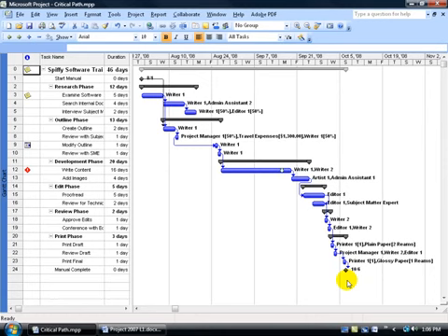Now what we did to find out what series of linked tasks are critical or within the critical path is we came up here and we used the Gantt chart wizard to format that path in a color of red. Well, there's another view that you can go to that already has the critical path colored in red, and in addition to that, it's actually got for the non-critical paths the amount of slack time that you have before it affects another task or it becomes critical.